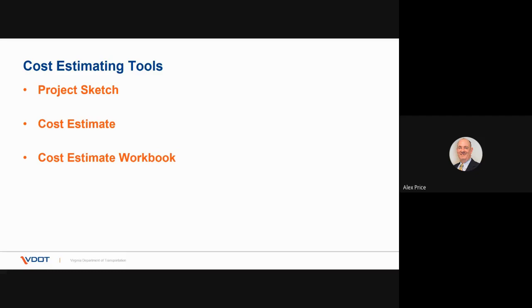The cost estimate should be as realistic as possible and account for known items and quantities, as well as those quantities that will be determined later during the development of the project. We would expect a few items or quantities to be grouped together using lump sum pricing, but documentation and justification for how the cost is developed needs to be included.